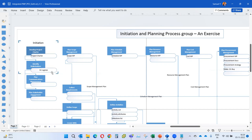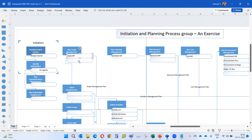Moving to scope — for every knowledge area, the first process is planning that area. So 'Plan Scope Management' is a process whose outputs are the scope management plan and the requirements management plan.